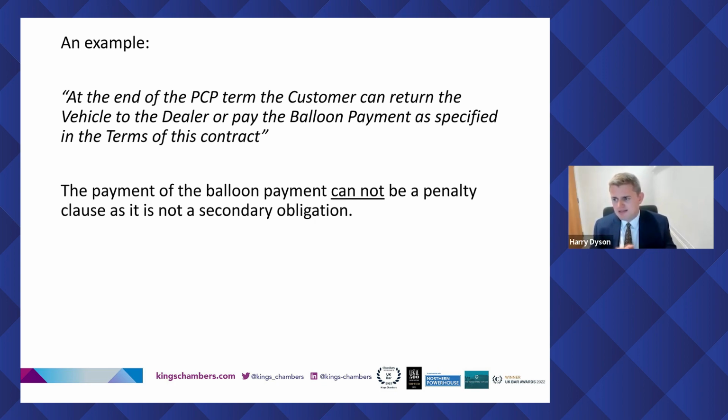But unfortunately, it isn't. So Cavendish is a really good example. Here, their lordships, in terms of the first clause, which was to circle back, that if you set up and competed, you would not be entitled to the final 2 instalments of the purchase price. 3 of their lordships found that this actually was not a secondary obligation. They found it to be a price reduction clause and a conditional primary obligation. So they basically said the choice was there, and that's what Mr Bessey took, and that was a primary obligation. Therefore, it's not capable of being a penalty clause because it doesn't get over that first hurdle. The remaining 4 lordships disagreed. They said, no, it is a secondary obligation, and it is capable of getting over that first threshold and capable of being a penalty clause.